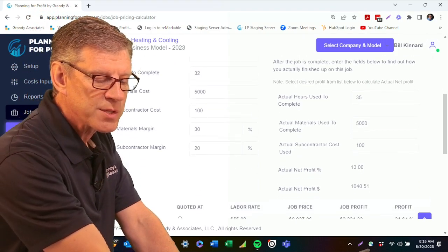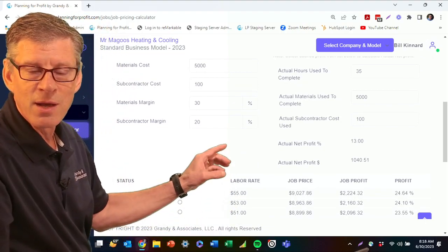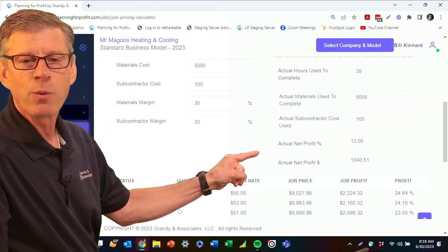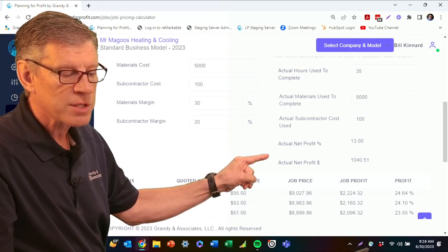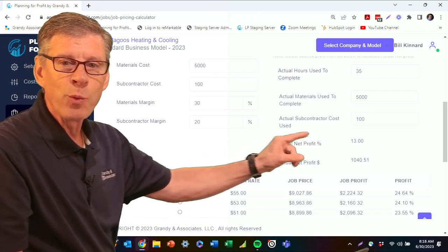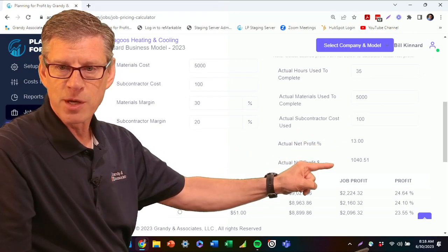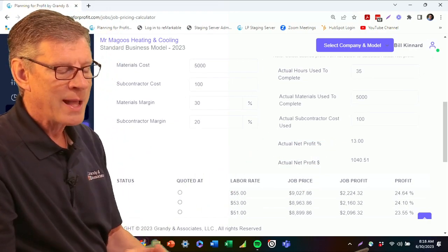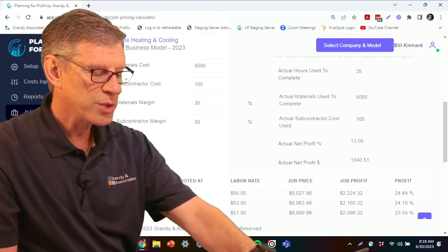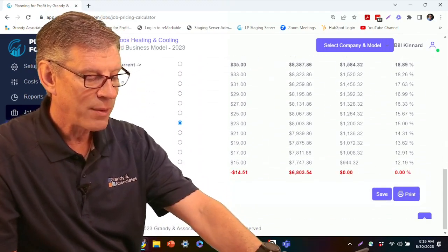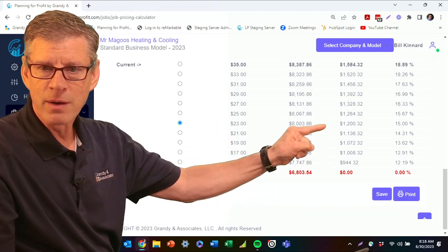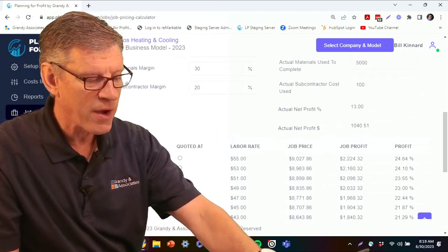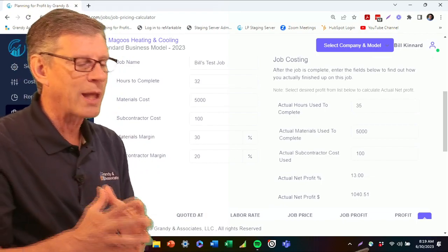And what you'll see is it's now going to tell us what our exact net profit was. We quoted the job at 15%, but in reality, because of the fact that we took more time, we only finished the job at 13%, which is $1,040 in net profit, not the original target that we had down here of $1,200 right there. So again, it's telling us very quickly what was our actual net profit on the job.